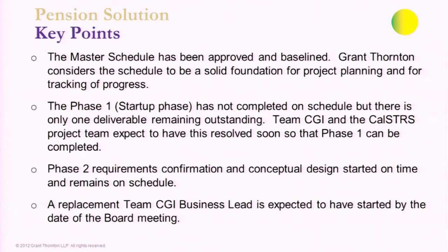As Randy had said, the projects have been going through the stage one planning activities. When we last spoke, I'd mentioned that of all those planning deliverables, the one we considered the most important was the master schedule, and that's what we'd be focusing on a lot. The master schedule has been approved and baselined. We did our own independent review of the schedule. We think it's a good schedule.